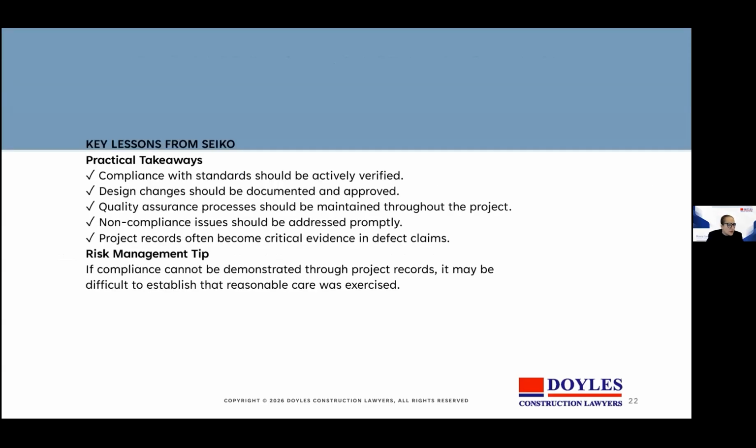So practical takeaways: compliance with standards should be actively verified. Design changes should be documented and approved. Quality assurance processes should be maintained throughout the project. Non-compliance issues should be addressed promptly. And the project records often become critical evidence in defects claims.